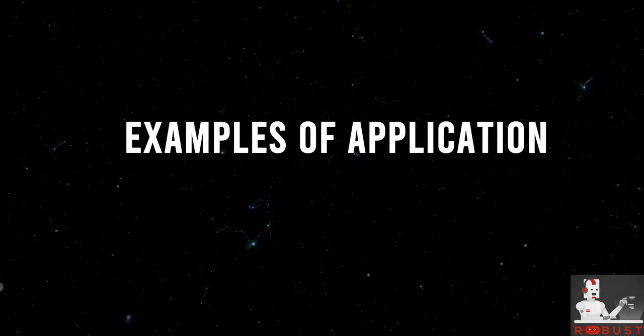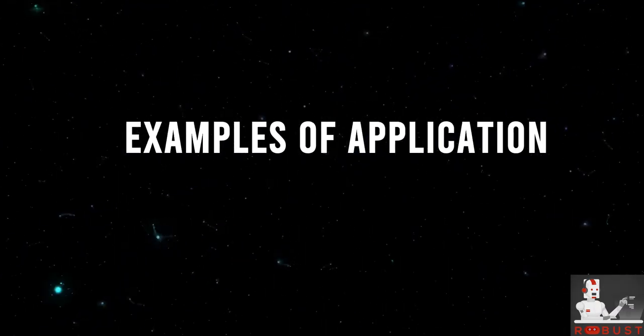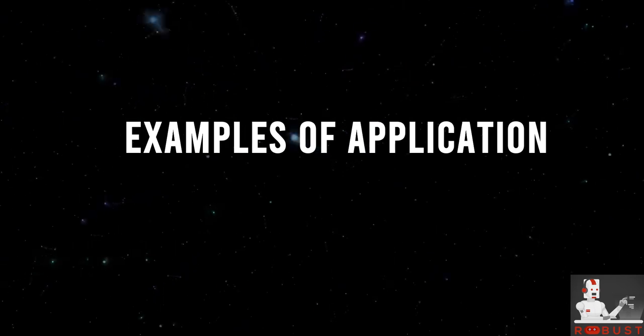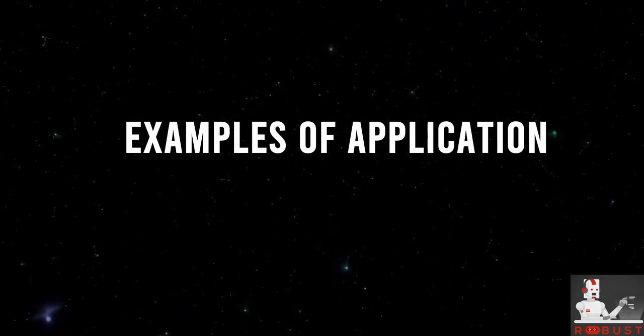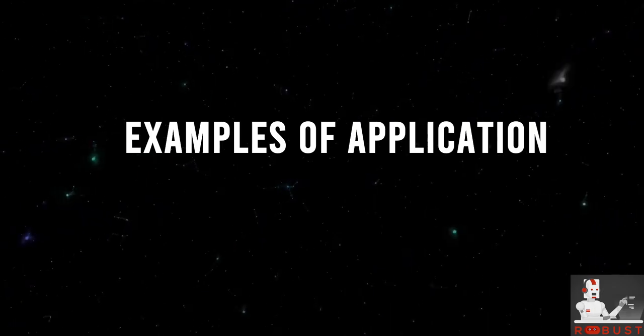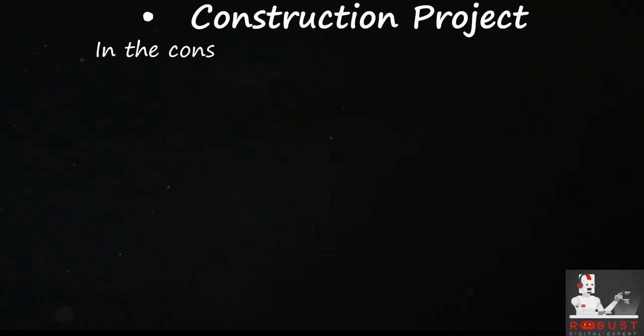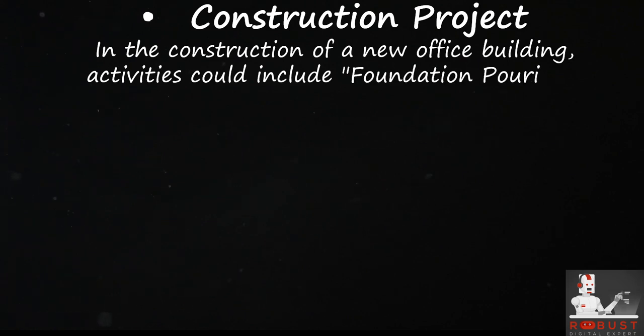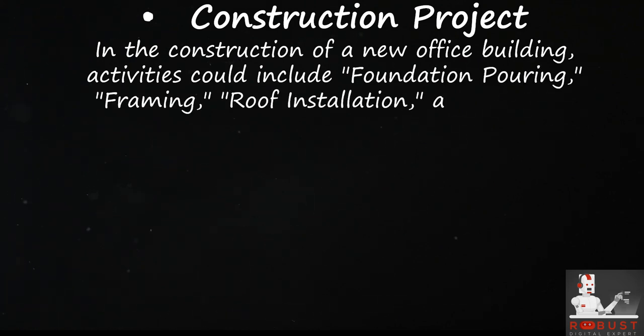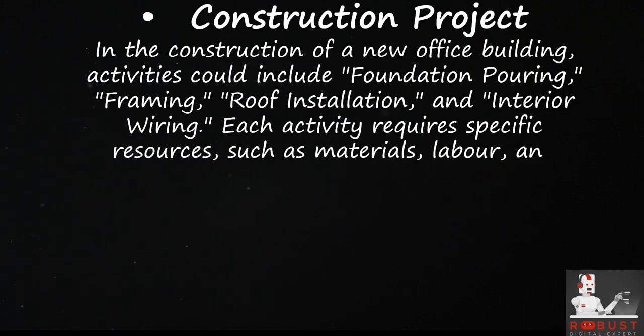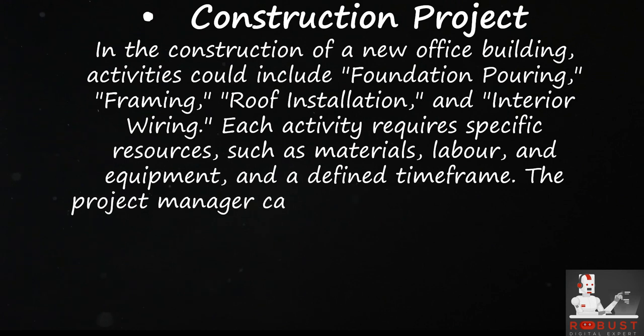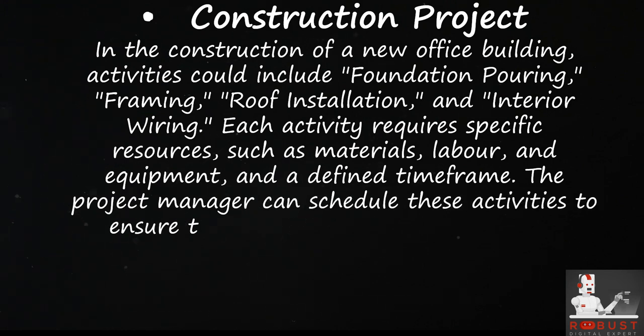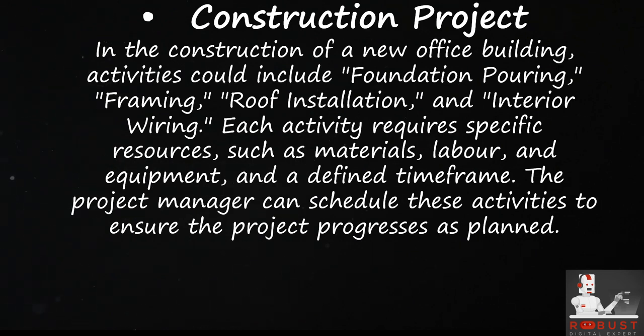Examples of application. Construction project: In the construction of a new office building, activities could include foundation pouring, framing, roof installation, and interior wiring. Each activity requires specific resources, such as materials, labor, and equipment, and a defined timeframe. The project manager can schedule these activities to ensure the project progresses as planned.